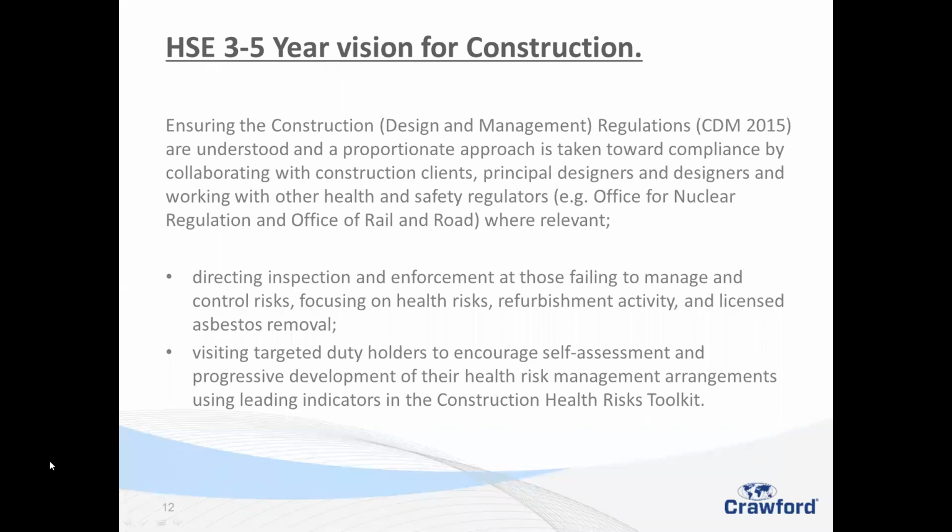In other words, I have decided that over the road there is a cafe. The cafe are quite happy in writing to say that the guys can go in there, buy a cup of tea and rest and keep warm on their breaks. But we need that in writing, why they've done it, and that everybody's happy for them to use that. But I can't see many people allowing you to pop in, use the toilets, put your feet up, etc., and get away with that. Again, your operatives, if they're buying anything, you've got to support that by financing it. So again, it's all about doing as much as you can to meet the regulations.